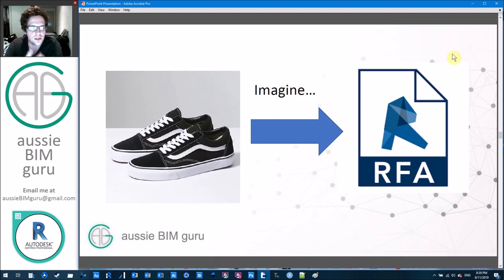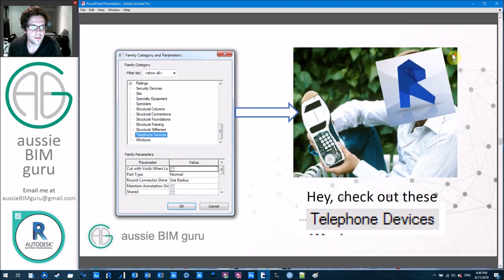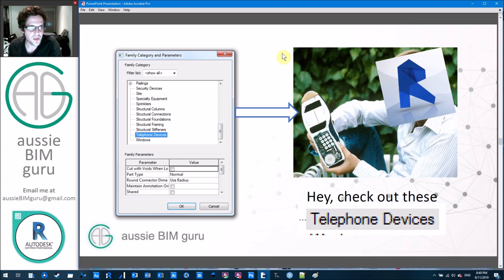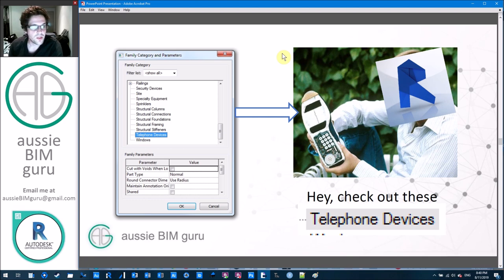Think about this: imagine that the pair of shoes you wear are going to be turned into a Revit family. Revit only understands what you tell it. If that shoe is categorized as telephone devices, Revit has no way of fixing or understanding it's a mistake. It's really important to consider things like casework versus furniture, specialty equipment versus generic models, because you need to schedule these things together sometimes. All plumbing fixtures should be kept under the category plumbing fixtures — basic stuff, but really important.